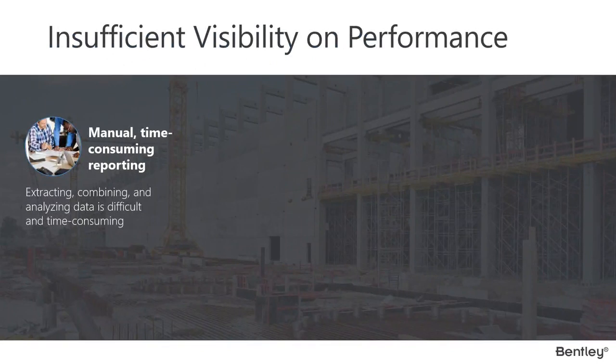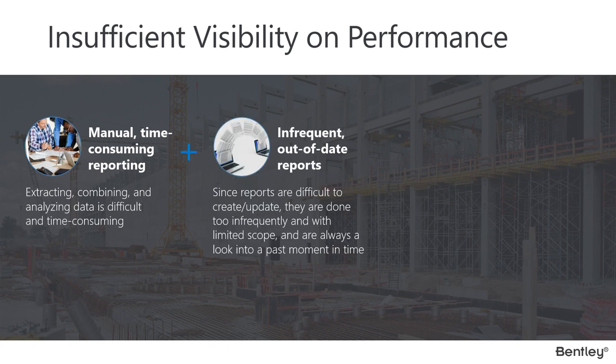With that variety of data and that complexity, where we are in the construction industry right now in terms of getting automated data flow for the entire life cycle of an asset, we are far away from it. If you look at an actual construction contractor, there is a team whose job is to scour the data, manually extract it, feed it into a system, and then create a report. The frequency of the report is maybe bi-weekly or monthly. In the best case, it's a weekly report.